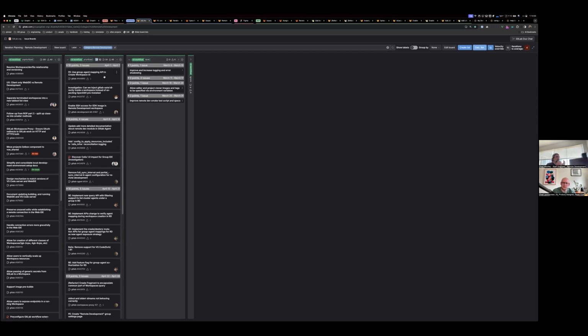Once we make sure it's been refined properly, we rock, paper, scissors a Fibonacci 1, 2, 3, 5, 8, or above. Anything above a 5 is an automatic veto. It's too big to prioritize, so it gets kicked back to refinement, like it shouldn't have been that big, or we missed something.